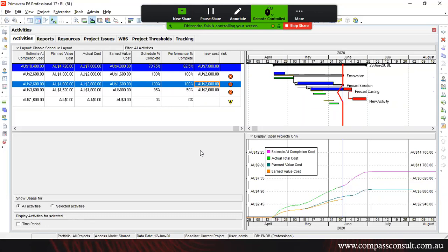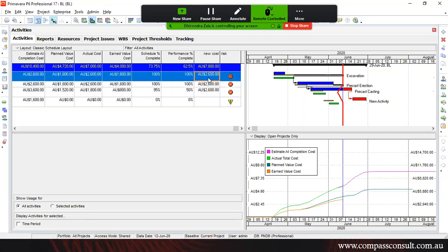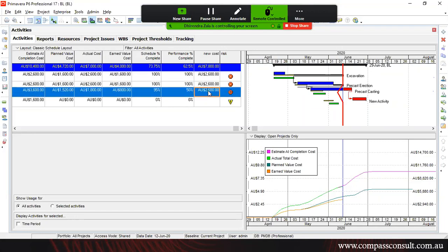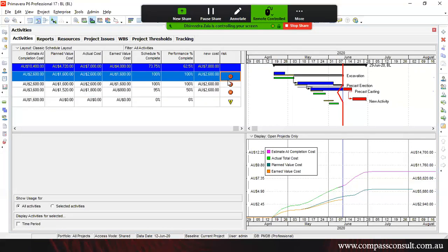Okay. So yes, Aisha. Actually, I have just created these columns as a dummy. Risk is the indicator column, which means you can use some columns in Primavera which indicate in some graphical way, but there is a universal rule. There is only a red, green, and yellow option. You cannot customize it. So we just use it for indicating something.